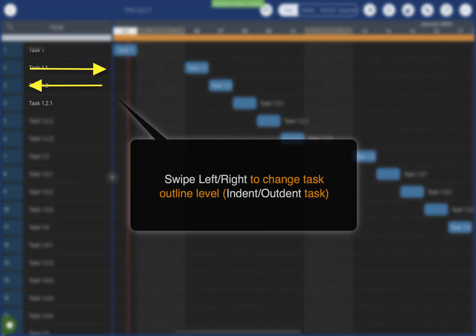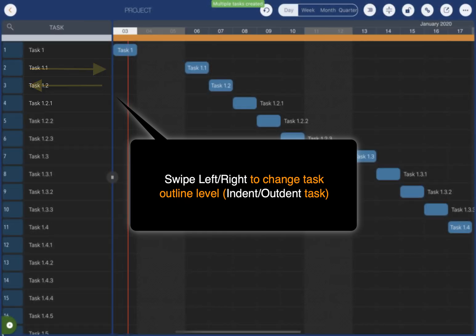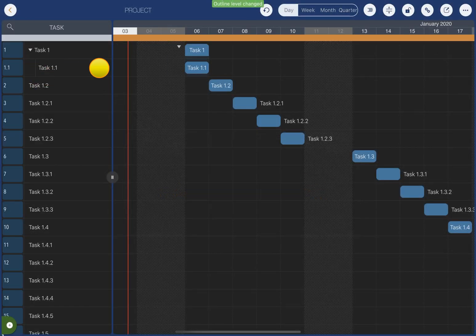Swipe left and right to adjust task hierarchy. We can organize the tasks in a tree structure efficiently.